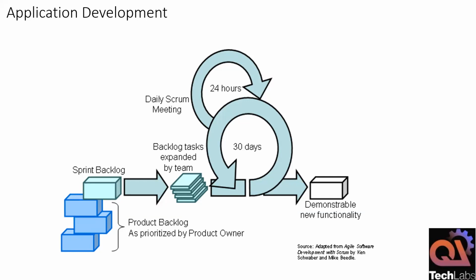For example, if I have a team of 8 members, I will be able to take close to 8 to 10 requirements, and then I will identify out of those 10 requirements what are my must-haves, what are my could-haves, right? My P1 and P2, and then every story is based on the importance of that particular feature.